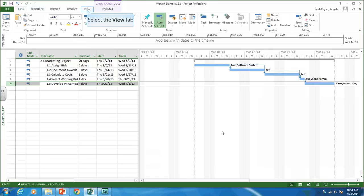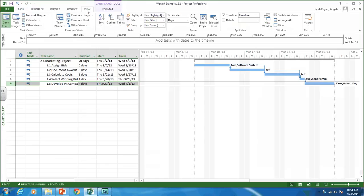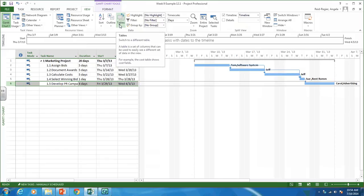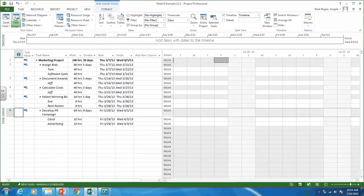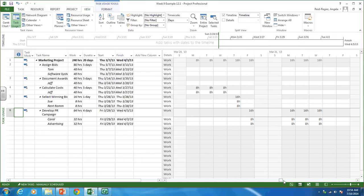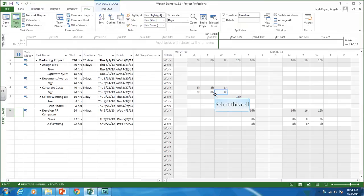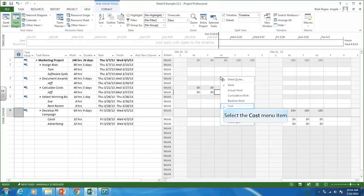Now we can create our time phase budget. Go to the View tab, then go to Tables. We can select Cost as one option. We also want to go to the Task Usage view. Click over here, and scroll over to where you can see your activities.